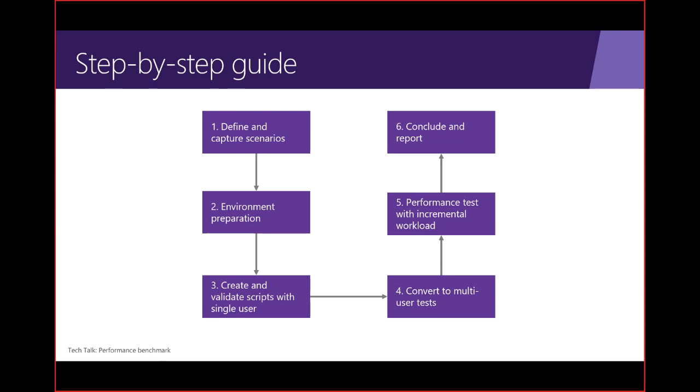You also need to talk with your customer and understand, when you run the performance testing, how much history data and how much peak transaction volume you need to test against, where you can get the configuration data, and who is going to load the master data for the testing. So you need to work with your customer and the project team and finalize those.